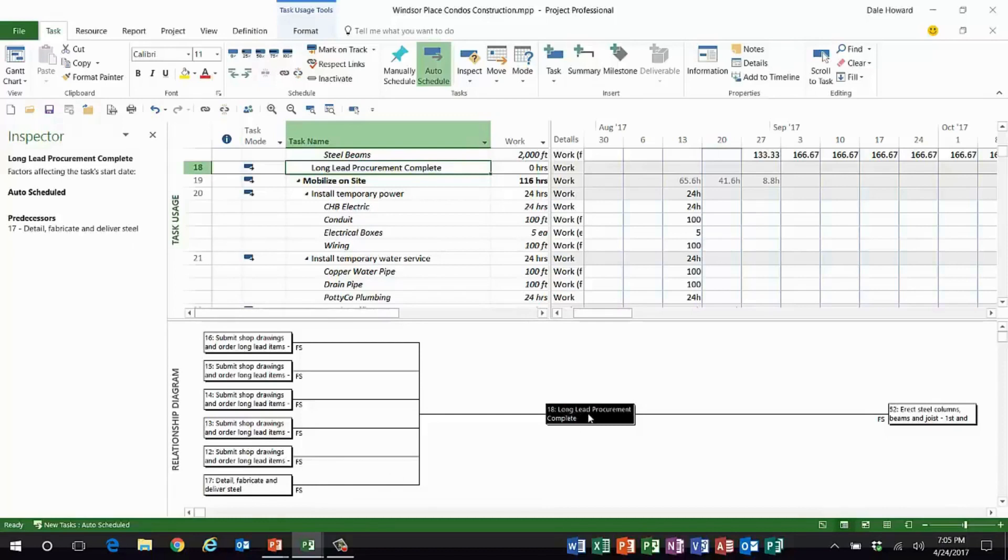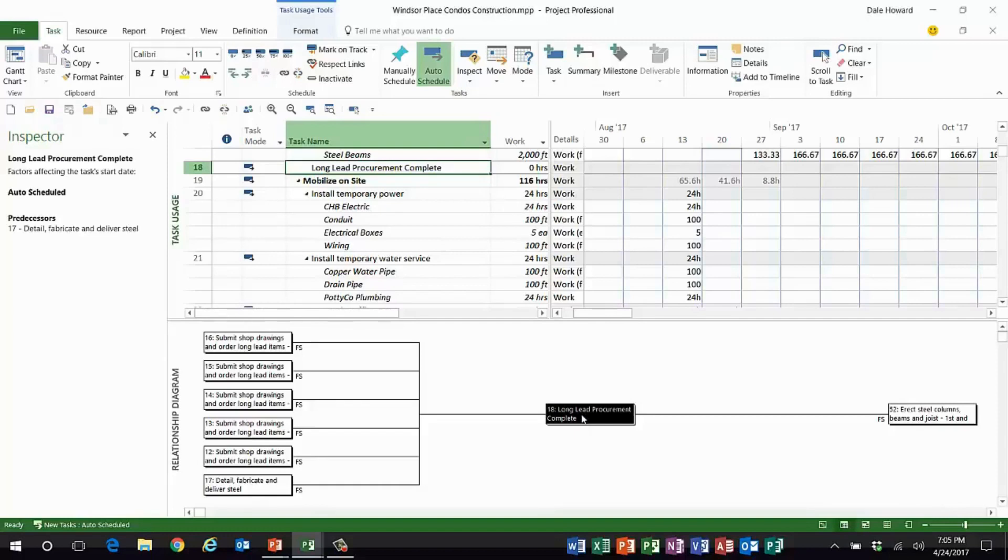Detail fabricate and deliver steel. This predecessor right here is actually the driving predecessor that controls the schedule of this task. So folks, there you have it. I hope you'll go ahead and create this new custom view, use it to your heart's content. You can even use it with the Gantt chart view if you'd like. Thanks everybody, we'll see you next time. Bye bye.